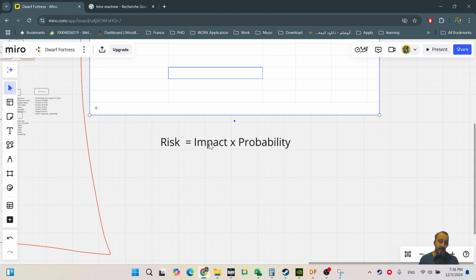But let's say you are in the middle of the winter and you are living in a city where every 2 days, every 3 days, you end up facing rain. So in that case, not only is the impact high, the probability is also high. But how did you calculate, for the case of rain in summer, the impact and probability? You didn't calculate the impact and probability in a quantitative method. What you used was a qualitative method.